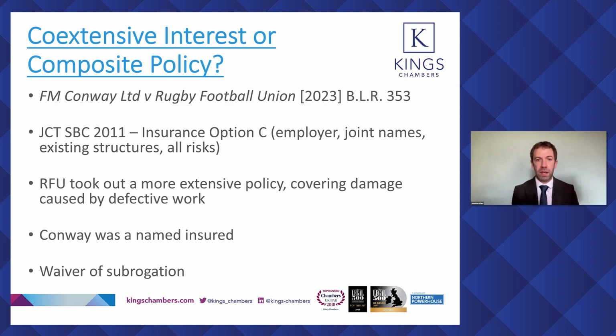a policy that did provide cover for the consequences of defective work. There was also a waiver of subrogation provision, and Conway was a named insured under this wider policy. And on the assumed facts of the case, Conway caused damage by defective workmanship, specifically cables were pulled through defective duct work and the cables were damaged. RFU apparently incurred over £3 million in replacing those cables.